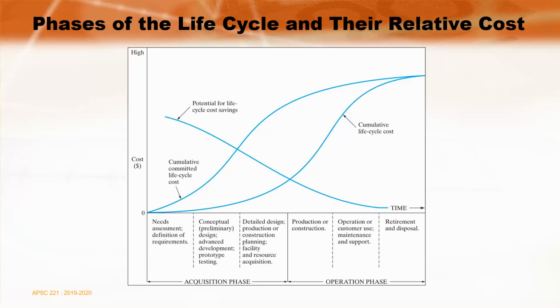Well, those committed costs get signed up early in the cycle, and usually with those kinds of contracts, there's a penalty clause if I back out, and so it does cost me something, even if I don't make the payment in terms of actually signing a check or sending some money to someone's bank account for their labor, because I'll do that when the construction starts and they've actually expended the labor. But in many ways, I've committed to spending those costs long beforehand.